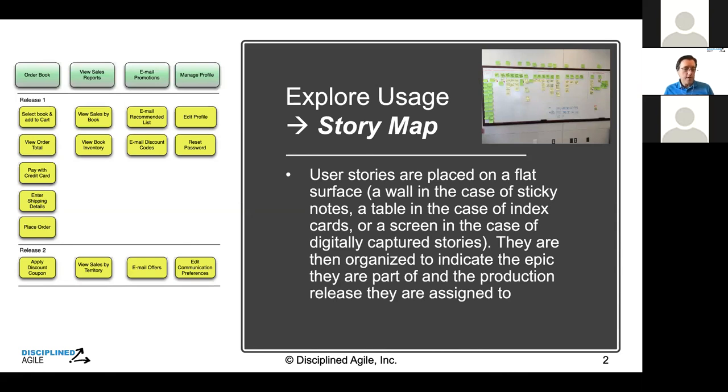You know that it's important to do the tricky bits, to do the tricky stories, not just the juicy bits or the high value stories. You want to mitigate risk early in the project. So what the technical people have done is the 2 columns of green stickies on the left-hand side represent the key technical risks. They're using a bunch of new technologies.